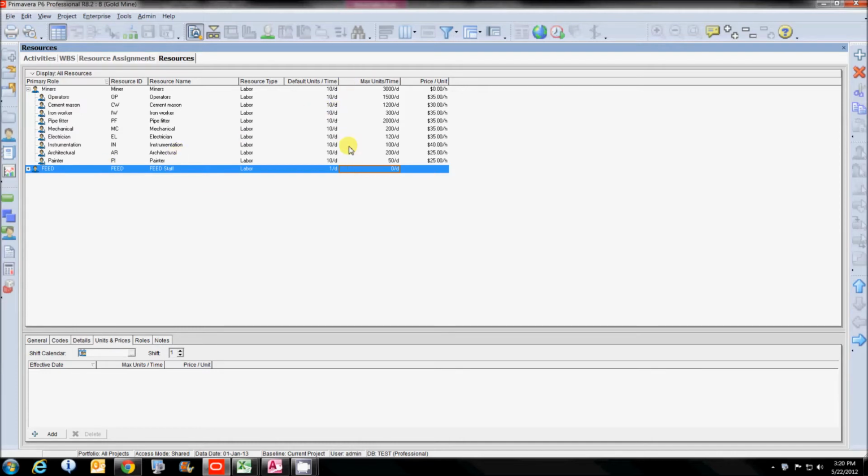We're using a 10-hour day, 7 days a week. This really meant 2 shifts. They would work for 2 weeks and then shift out, 2 weeks on, 2 weeks off. This was high altitude. They were actually working closer to 12 hours, but productivity was so bad we reduced it to an effective 10-hour day.